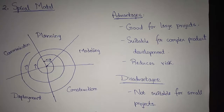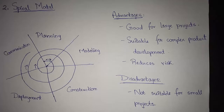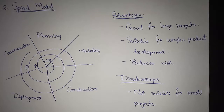In the initial path, we give the product specification regarding that particular project. In subsequent passes, we develop more sophisticated versions of software. Here we can make adjustments to the project planning according to requirements. Cost and schedule are adjusted based on customer feedback. The project manager adjusts the planned number of iterations required to complete the project. Unlike other methods, the spiral model is applied throughout the life of the computer software.